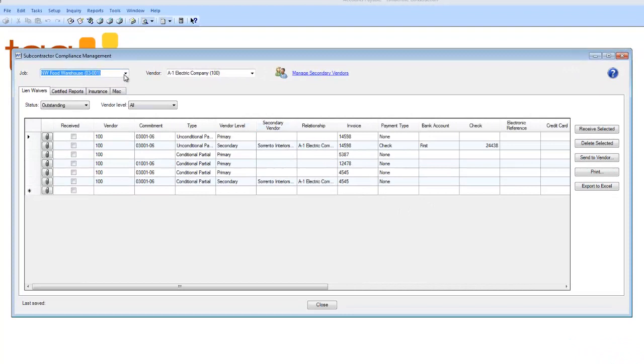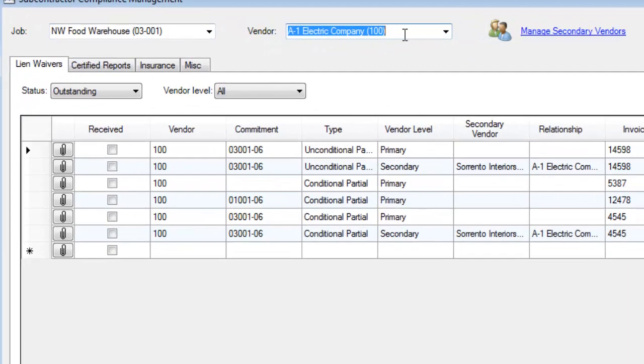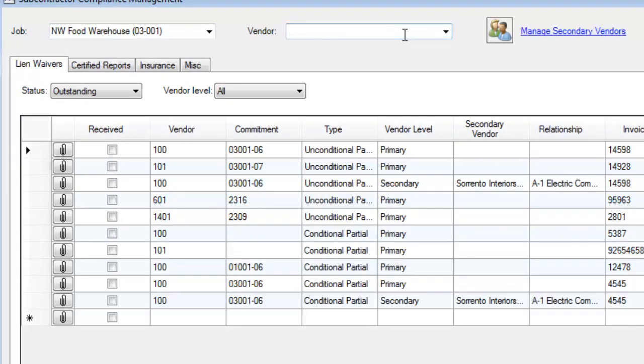This is separated by job and vendor. If I wanted to see everything for a job, I would just delete the vendor and it would show me all the vendors that have compliance issues. As you can see here, I have multiple unconditional and conditional lien waivers that I need to receive.